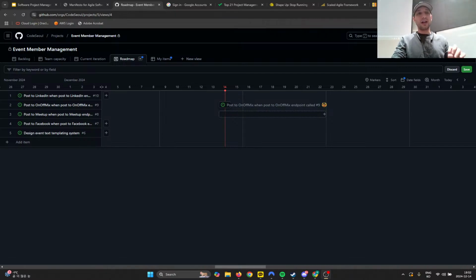but the idea with Scrum is that the goal is to have consistent delivery, right? So even if you're giving yourself a buffer to do bug fixes, if you're still able to deliver a consistent number of points, you're good. Because then you can scope stuff down: we know we can deliver 40 points, so let's make sure whatever we determine gets scaled down to 40 points, and we can deliver every sprint. And if that 40 points is leaving room for bugs and you spend the last third of the sprint doing bugs, that's fine. The point is consistency, so that you can make things predictable, so that you can release predictably.